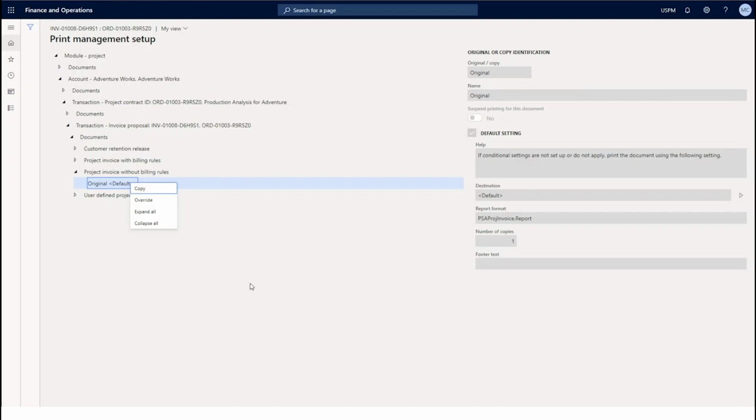And the formatting is not simply restricted to the layout where the address prints or where the amounts print. We also have capabilities where you can put in a summarization on the invoice that is slightly different for each invoice. So on one invoice, you can decide you'll roll up based on roles, or on another invoice, you could decide that you'll have one line per class of transactions. Say all time is summarized as one line, all expenses are summarized as one line. So that is a little bit about the printed invoice.